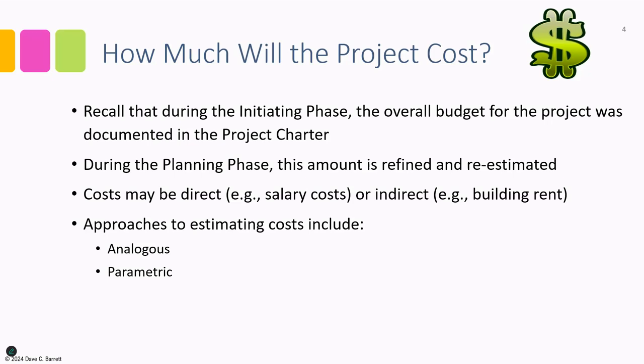An example is the easiest to do. If you were planning a banquet and you were going to hire a caterer, they may say the per person or per plate cost is $30 per plate or person. Well, then you could easily calculate the estimated cost by saying, well, if it's $30 and we're going to have 100 people, that will result in $3,000. So it's multiplying the unit cost by the number that you estimate to use.